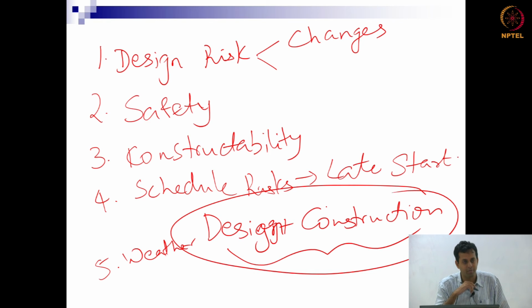So essentially you've got to do a couple of things, right? One is you've got to try to figure out how you mitigate risk, and one way of mitigating risk is getting design and construction to talk to each other. That sort of helps mitigate risk a little bit. Another way of looking at it is you can look at the contract, and you can try to put things into the contract. Yes, there are a few. Larsen and Toubro, for instance, does both design and construction. There's a certain form of contract called a design and build contract, where you go to somebody and say, you design it and build it for me, right? Turnkey contract, as people call them. So there are some firms across the world, but by and large the industry tends to be specialized.